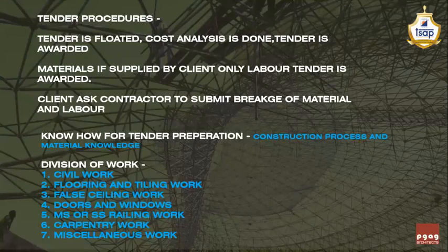Like for example, while preparing a tender, you should be aware if the material is supplied by the client or if it is a labor tender. Sometimes the client floats only the labor tender as well. The client asks the contractor to submit the breakup of the material and the labor in such cases.